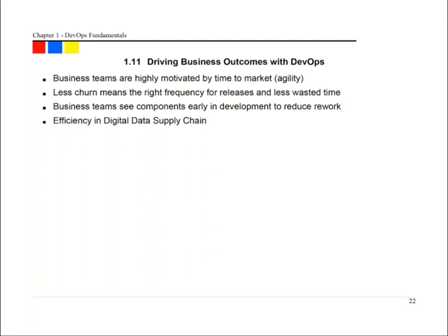And so what that means is business is motivated to request everything they can possibly think of, throw it all into the requirements bucket, including a lot of things that they don't necessarily know or understand what they need or what the result of having those features in, but they've got to get them in because it's their only chance. And they end up getting a product that has a ton of stuff that was relevant 12 months ago, somewhat less so now. And some of that functionality is not necessarily things that they really expected because they didn't get a chance to have input during the process.